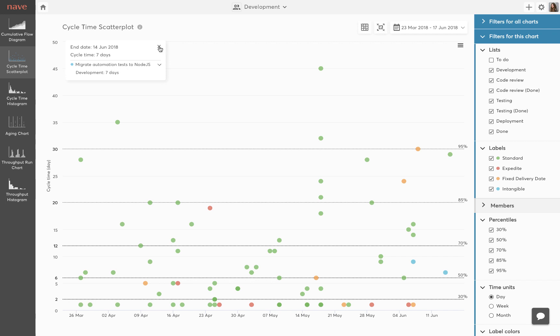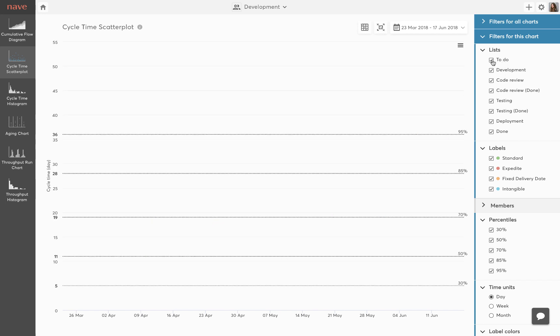Let me quickly show you how to track lead time with the cycle time scatterplot. Lead time is the total time tasks spent before the work is released. It consists of both the time a task has stayed in the to-do list as well as the time it remained in progress. You can easily track your lead time by checking the to-do box under lists in your filter section.